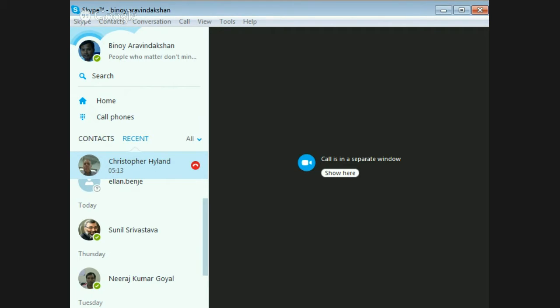These little blue boxes I've put on top of the slides are just some comments. But you can see it's a spreadsheet type of format that indicates what we call interim payment applications, usually every month. So you've got month 1 through to 9, 10, 11, 12, however long you go. The interesting thing to note, if you can see my pointer, is advance payments are usually paid at the beginning of the job, maybe about 10%, so the contractor has some working capital. Then that's progressively recovered, 5% each payment.